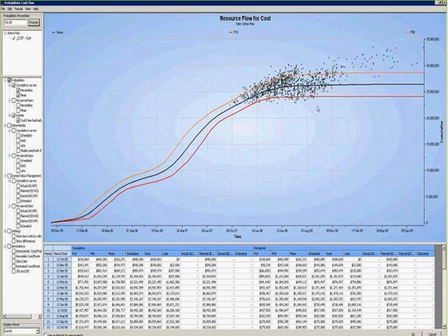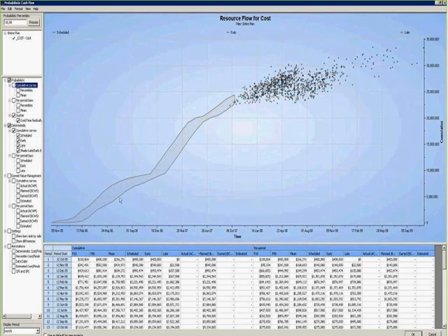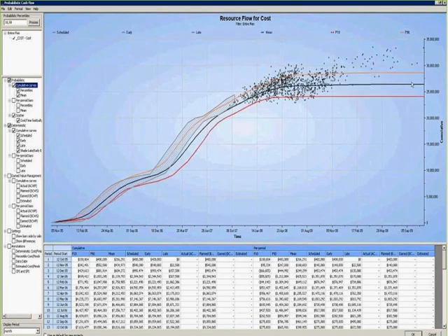You'll notice that a lot of what's going on over here is where you think your project and your NPV will look like in terms of costs. And you'll see that your costs are going up. So you can look at this as a cumulative curve, and you can compare it to the deterministic. If we were using conventional project management methodologies, it would tell us that this is what our cost curve would look like. But when you simulate it, you realize that it could be actually very different, cost you a lot more, and take you a lot longer than what your deterministic estimate is.